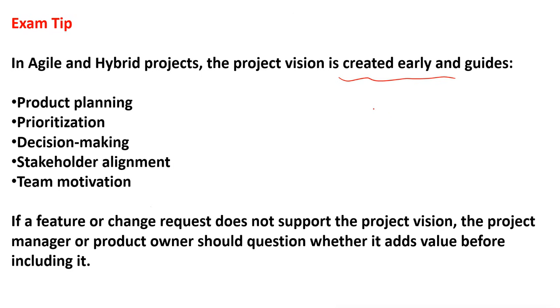If you see that the feature is not included, you do not have to reject the request, or accept it immediately. First you have to analyze. A project manager or product owner should question whether it adds value before including it. If you think that the feature adds value, then you have to change the vision statement.